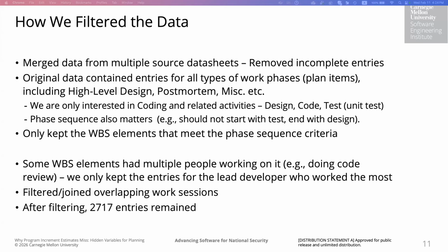Another thing is that when we looked at the time logs, it was clear that some were backfilled and not actual stopwatch time, because we noticed some overlap in the sessions, which would mean that one person is doing more than one thing at a time, which is not really possible. However, this was less than 5% of the data, and such data quality issues are not uncommon.